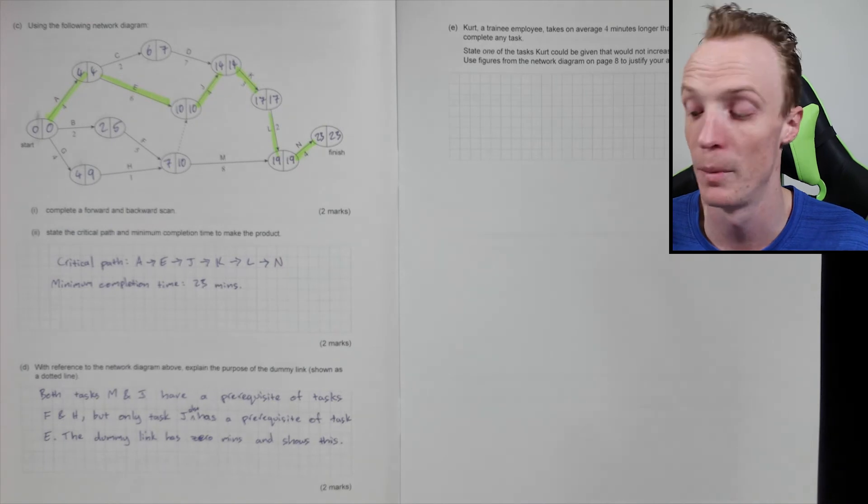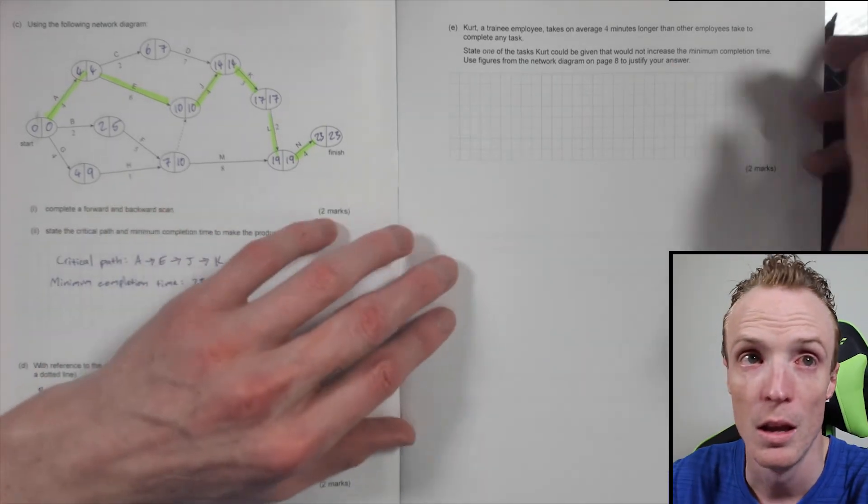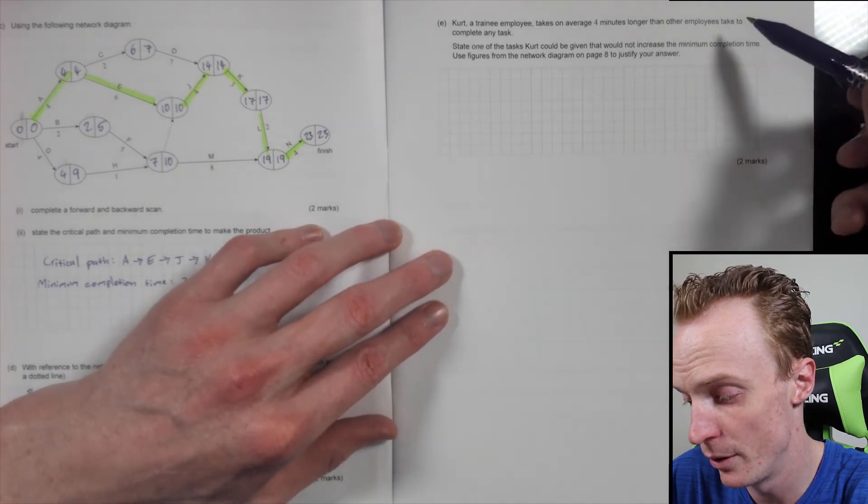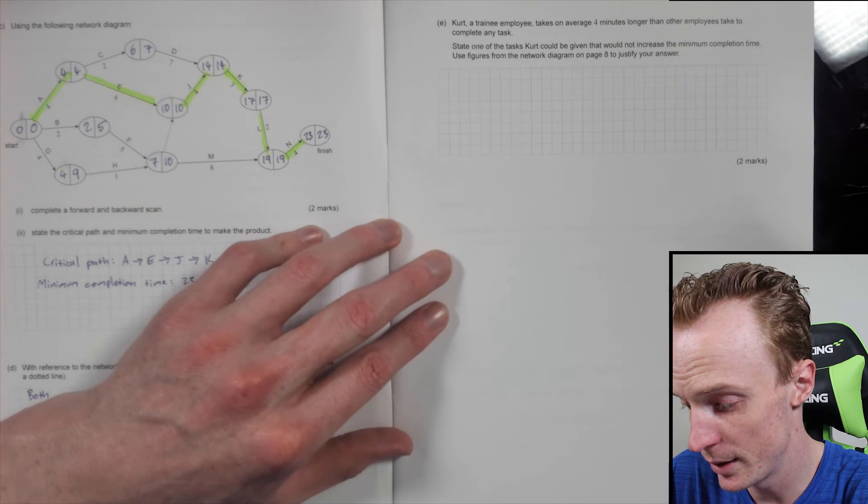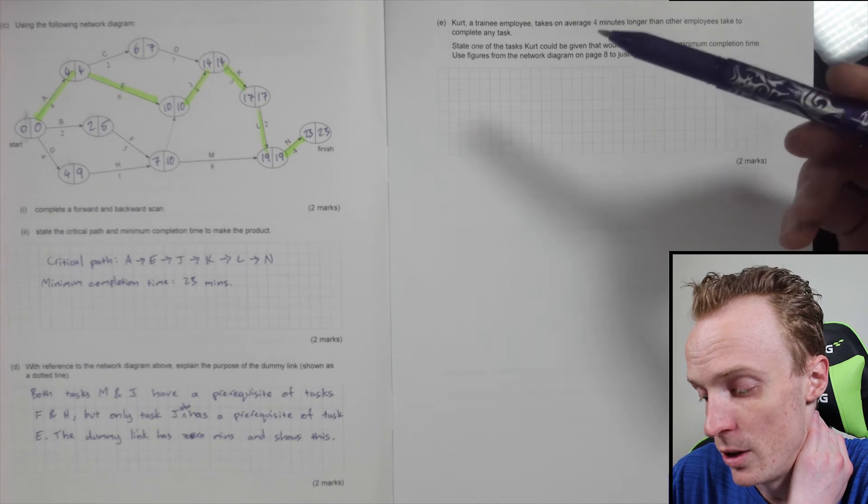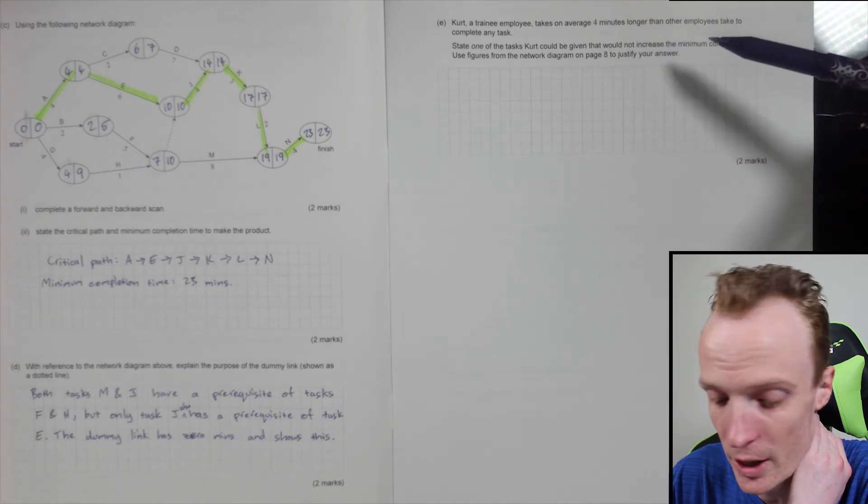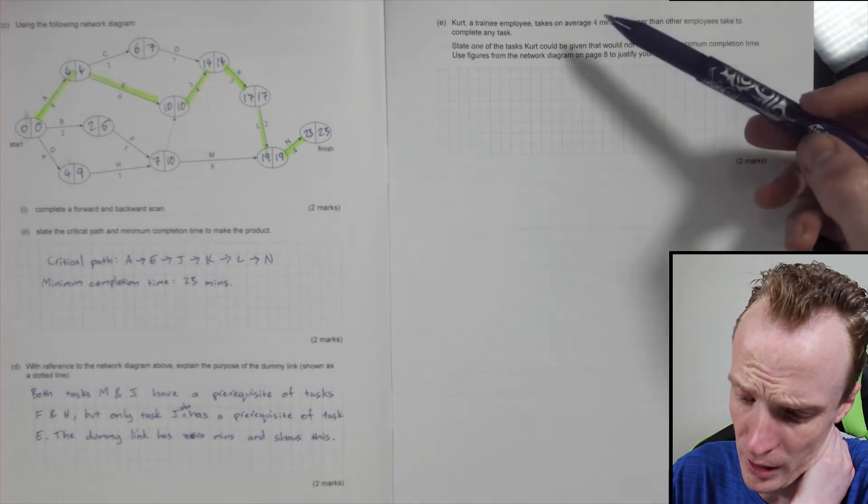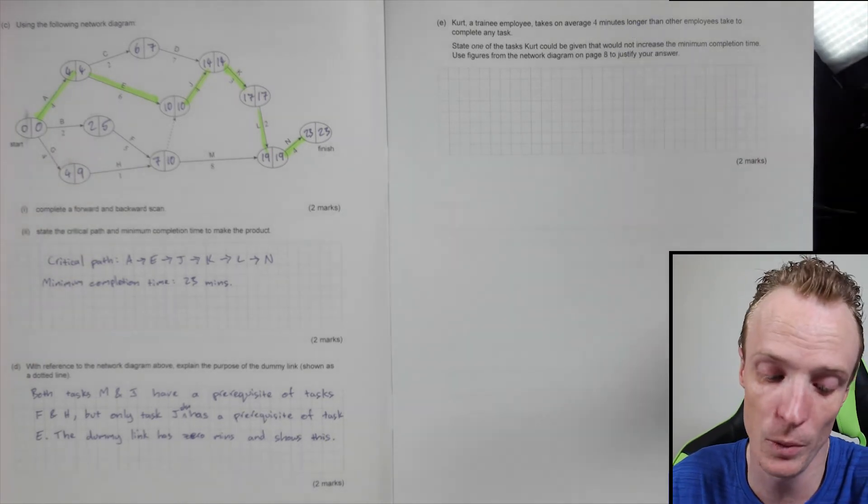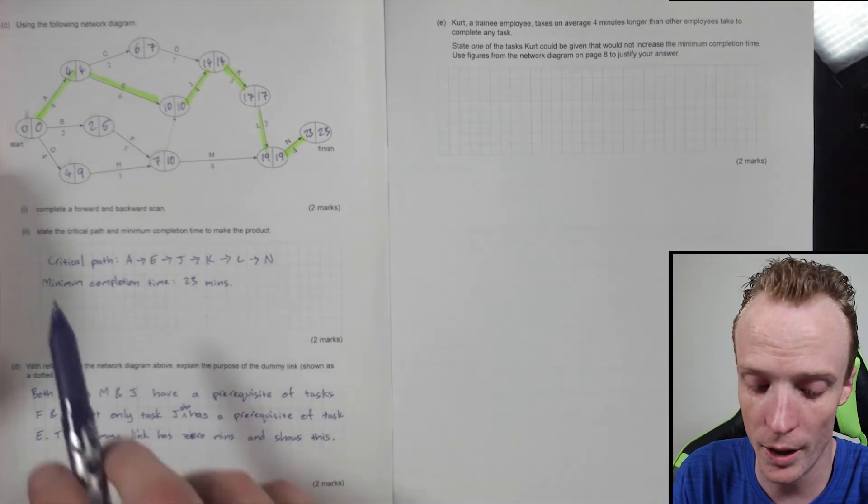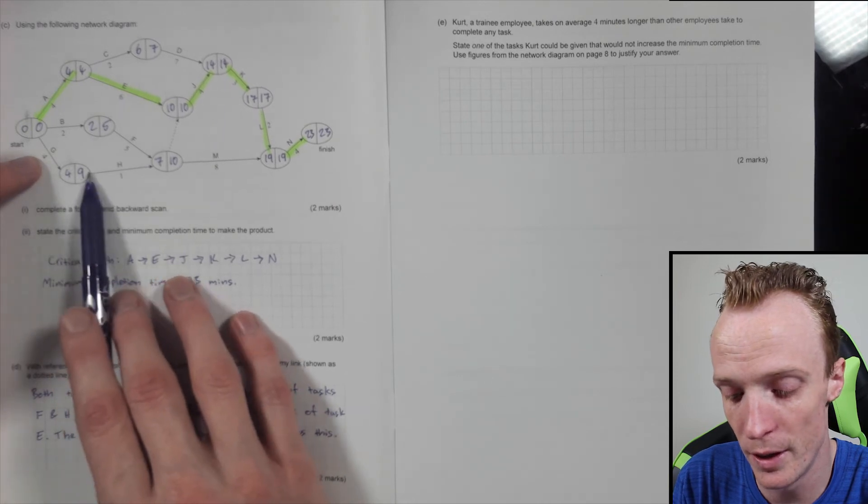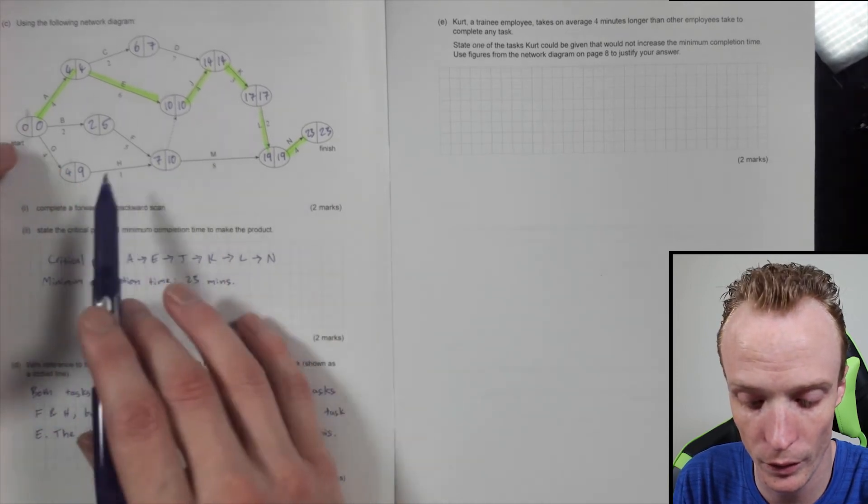Alright, now Kurt, a trainee employee, takes on average four minutes longer than other employees to complete any task. State one of the tasks Kurt could be given that would not increase the minimum completion time. Use figures from the network diagram on page eight to justify your answer. So really what we're looking for here is somewhere that has a slack time of four minutes. That's really what we're looking for, anywhere that you can find that. We've got it. I can see the easiest one's probably here. You can see that we could delay this by five minutes and there'll be no increase to this.